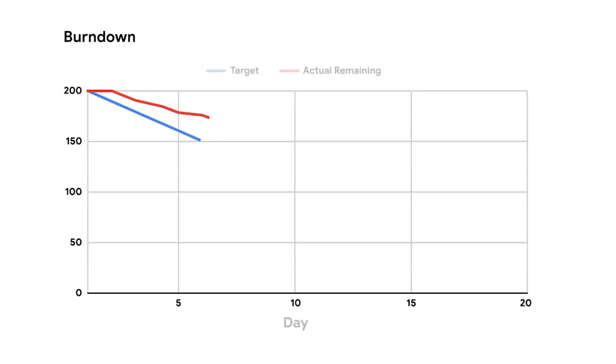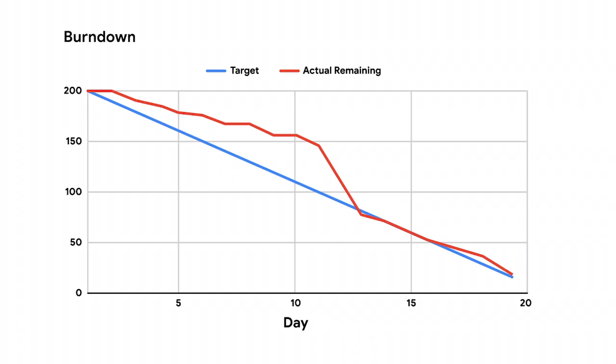Here's an example. Let's imagine our virtual Verde team's sprints are 4 weeks long, which will count as 20 business days. In their July sprint, the sprint backlog had stories that added up to a total of 200 points to be completed. If you assumed an even burn of points over the business days, you'd expect 10 points to be burned each day. By day 5 in their sprint, 22 points had been burned or completed. Okay, it's only 25% of their sprint, so maybe things are on track.